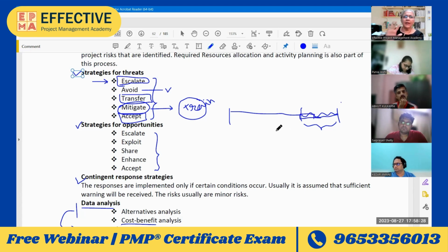What do you do about it? Nothing. I know that the project is going to get delayed by 2 weeks, but rather than covering that entire delay, I have other headaches to attend to. I'm not going to do anything about it. So just accept. These are the 5 strategies for negative risks: escalate, avoid, transfer, mitigate, and accept. There are similar 5 strategies for positive risks also: escalate, exploit, share, enhance, and accept.